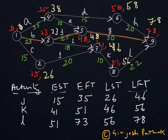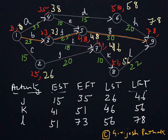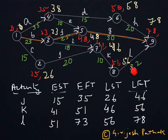Now you find on this network diagram that for various nodes like node number 1, node number 3, node number 5, and node number 9, the earliest time and latest time are the same. For example, on node 3, the earliest time is 23 and the latest time is also 23. But for other nodes like node 8, the earliest time is 51 while the latest time is 56.